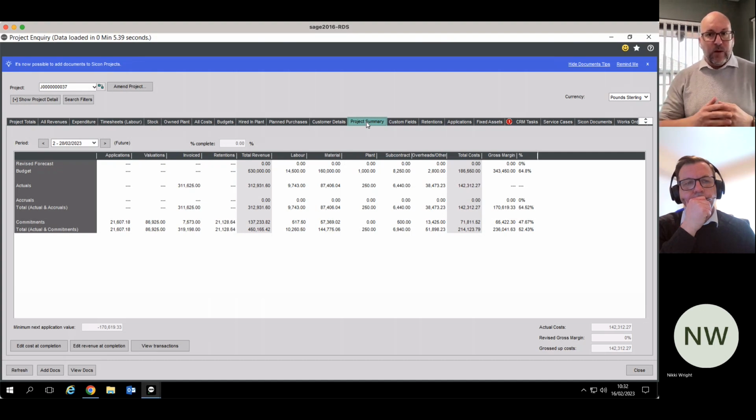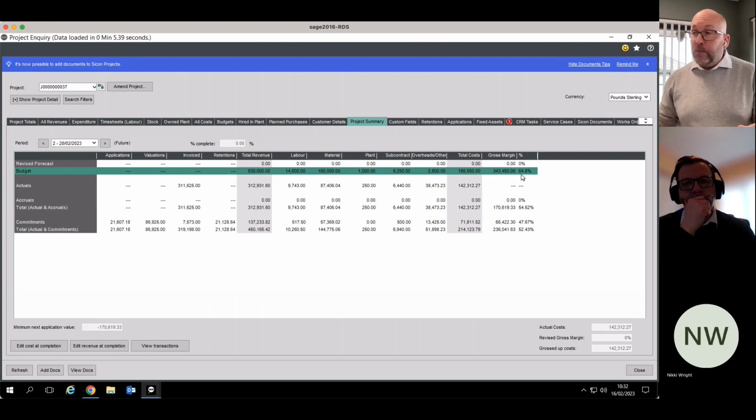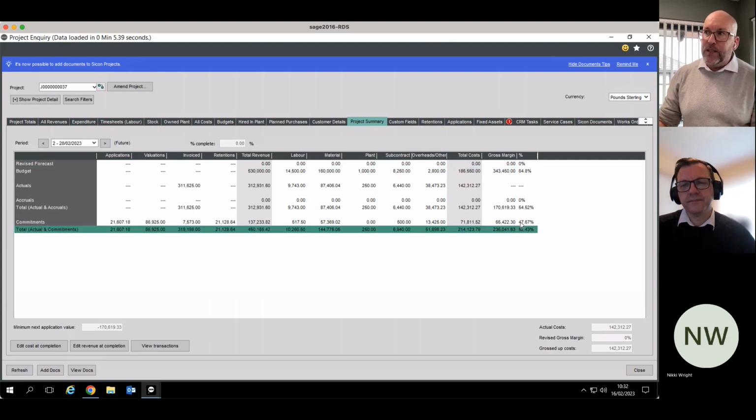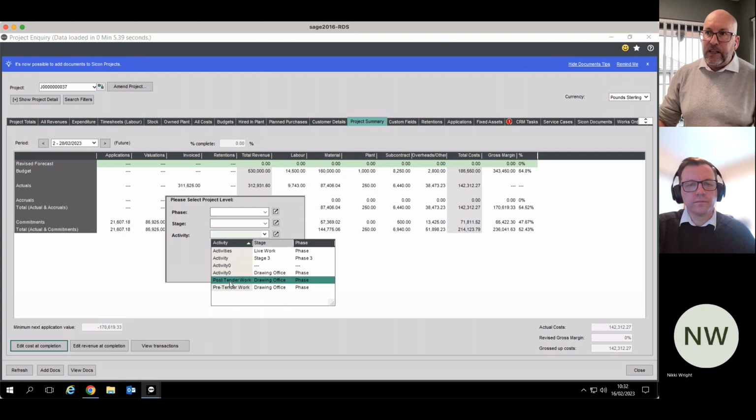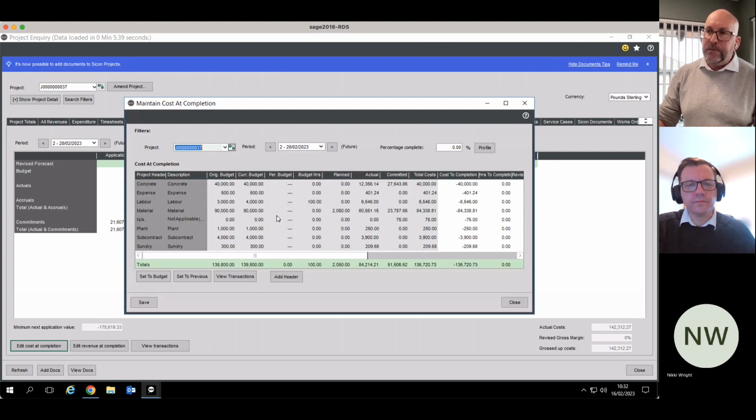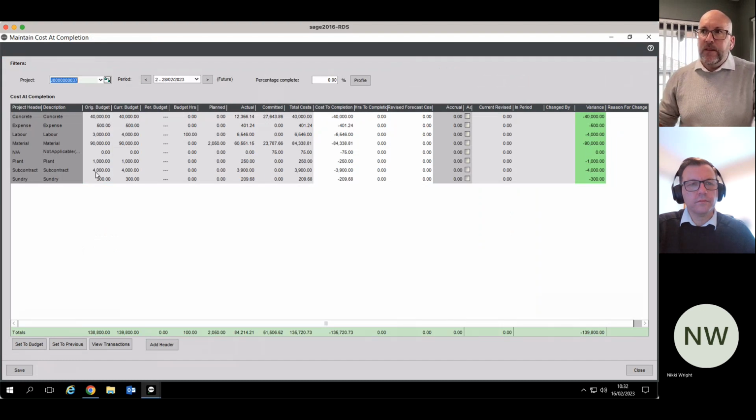So it's really important for them to be able to say, well, where are we? Where do we think we're going to finish? So, for example, here being able to see, and I am an eternal optimist, Howard, so we hope for a 64% gross margin. We can see our actuals and commitments and accruals, so where we're currently operating. But enabling a project manager, or your QS, depending on whoever it is, to be able to go, well, okay, for this particular area, what did we budget? What costs have we actually incurred at the moment? So in terms of our actual costs and commitments. And then if I don't think there's any more costs, are we coming in under budget or over?